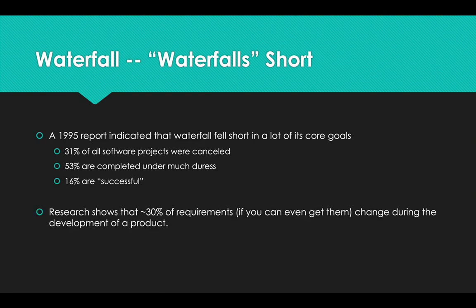If you look at other research on the volatility of requirements, approximately 30% of requirements actually change through the development of an individual project. And this is assuming that you can get requirements written down on paper from a client in the first place, which is not always true.